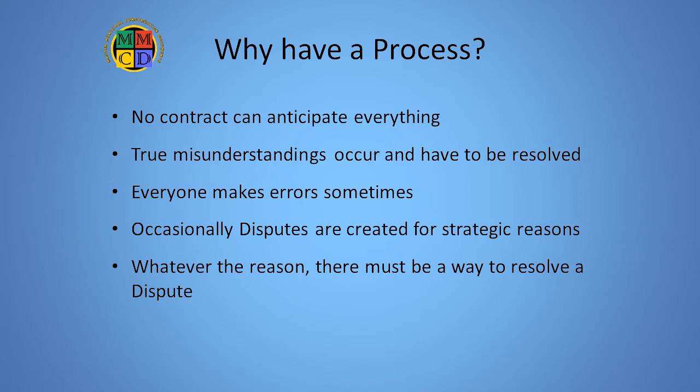Sometimes disputes are legitimate, but sometimes they are created for strategic reasons, such as attempting to create a delay, apply leverage to settle something else, prove a point or ego involvement, or obtain more money or other consideration. The reality is, no matter the cause of the dispute, it must be settled before the project can be considered complete and the files closed.